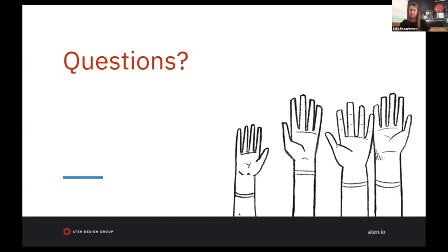We build in components. And the fact that we're working in CMSs affords us the opportunity to see discrete parts and pieces of the whole as it's built, and it allows us to iterate on those parts and pieces before seeing the whole. So I would explain to that person what your workflow process is and why it's advantageous for them to see pieces instead of waiting for the whole. I would appeal to their business sense and talk to them about the risk of sunk costs and rework at the end of the project, and why it's in their best interest to be involved sooner.